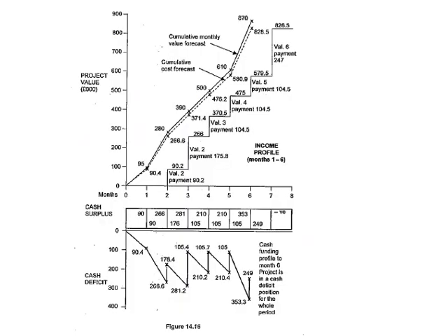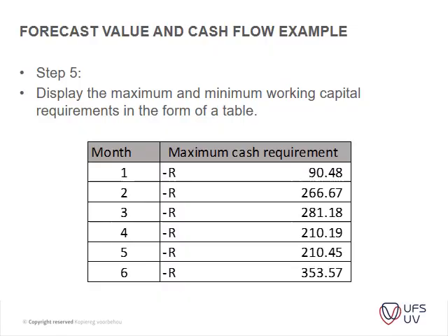So you can see after the first month, this is your cash flow deficit, and it still goes down, and then you can calculate what your value escalation is, and you can see that after month 6, you will have your biggest deficit. Cash flow funding profile to month 6: the project is in a cash flow deficit position for the whole of the period. So we're still not picking up our heads and getting close to the break-even point. Okay, so I think that's fairly straightforward.